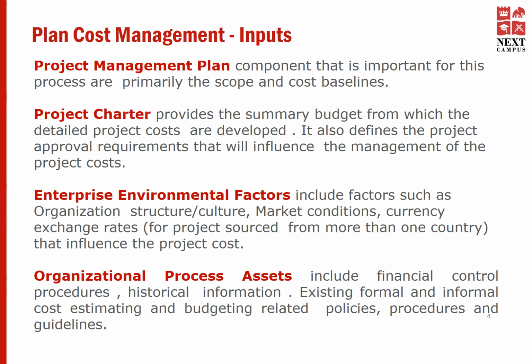Let's have a detailed look at the process components. First, inputs. Project management plan. Project management plan components that are important for this process are primarily the scope and the cost baselines. Project charter provides a summary budget from which the detailed project costs are developed. It also defines the project approval requirements that will influence the management of the project cost.